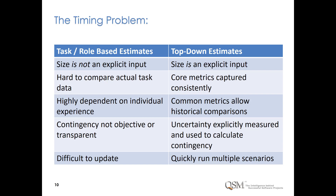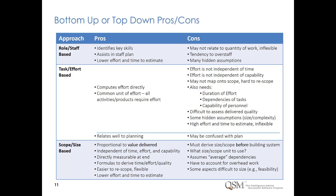Top-down estimates combine summary-level metrics from similar completed projects with observed relationships between project variables — time, capability, and cost. Top-down estimates require fewer inputs that are easier to capture consistently at project closeout. We can use historical data to tune estimates to our past performance and benchmark against history.